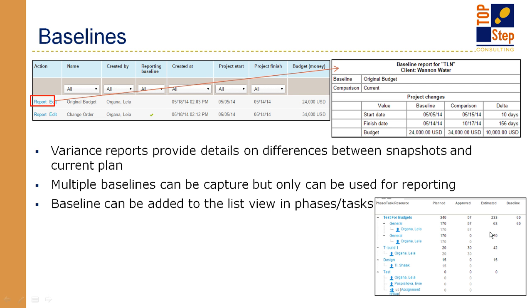What you don't want is to lose visibility to what your baseline is. So you want to make sure that you capture your plan as your baseline, and then you have whatever baseline you want to report against, but you'll always have that data. Once you update based on your estimate, you're not losing anything. It's not like you have to download files and save them to remember what it was, what it is now, what happened, that kind of thing. It will be captured in this baseline functionality. So I think that's really the nice thing about using baselines.